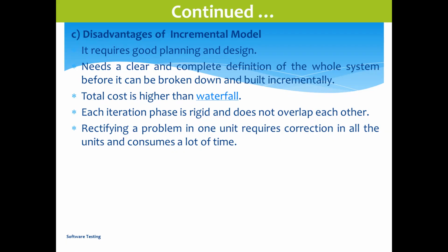It needs a clear and complete definition of the whole system before it can be broken down into builds incrementally. So you need to understand how it can be broken. You get the complete project, but how will it be broken build-wise? Which part will come in the first build, which in the second, which in the third? So high knowledge and experience is required. If experienced candidates, seniors, technically strong people or business analysts are not available, then it will be a problem. Freshers or less experienced candidates cannot do that. So this is one disadvantage.